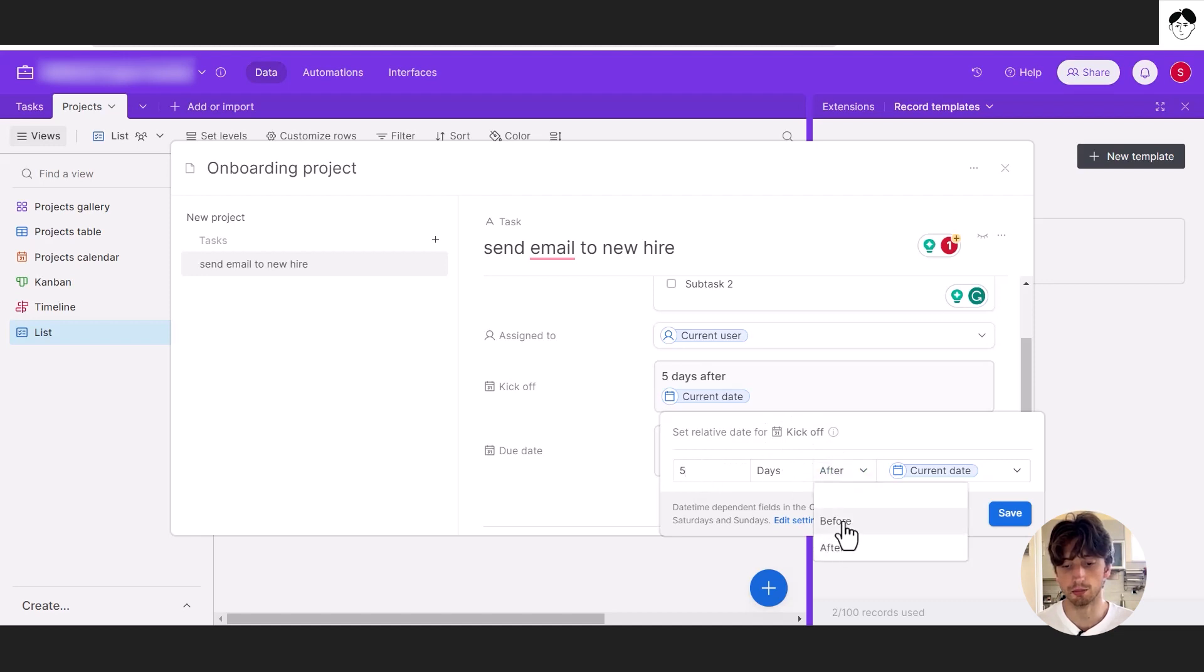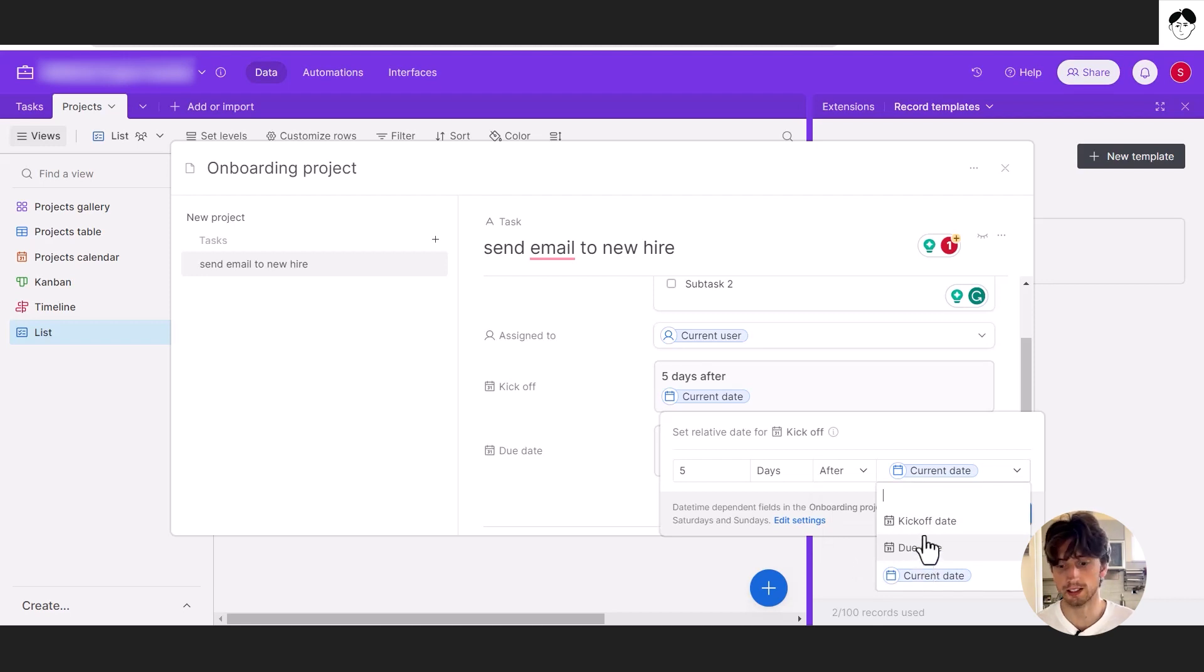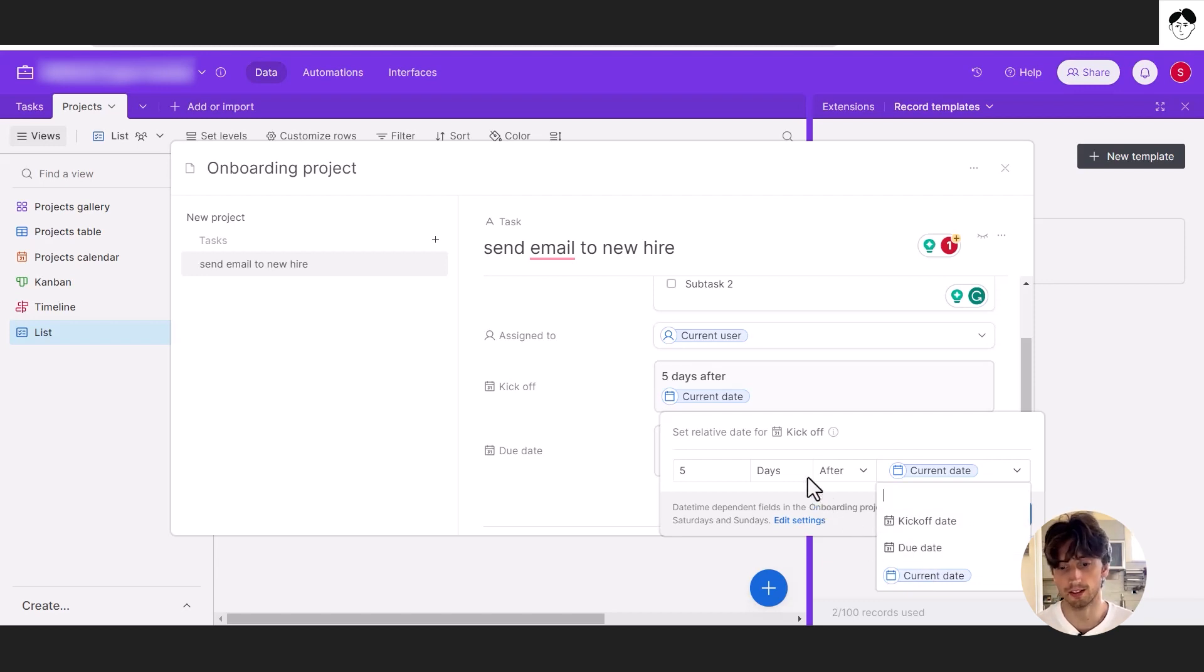Then here you can select before or after, after the current date, meaning the date of creation of the project. Or you can also select the kickoff date or the due date of the project. That's a powerful feature that you can do natively within Airtable.